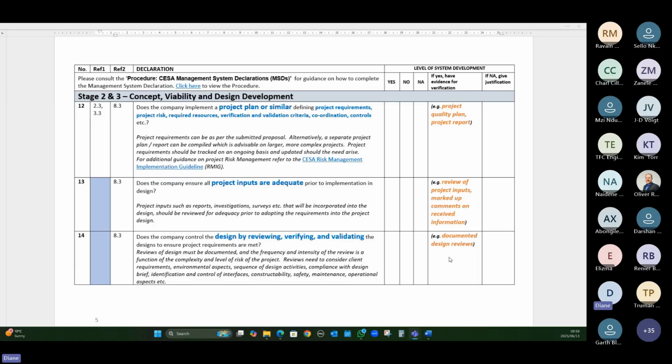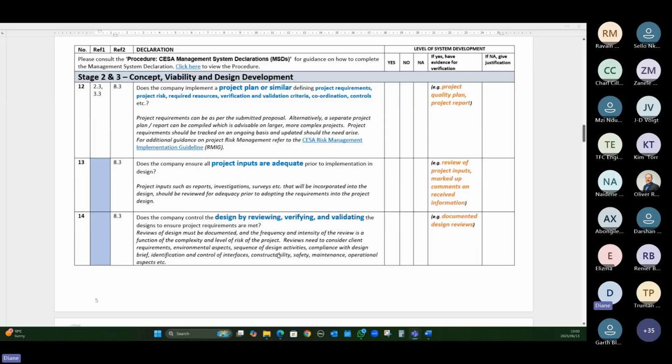If it's software that you're using, do a check with a spreadsheet, do a hand check, but just verify that whatever you get in is correct. It is in line with what you should be doing. And like I say, be creative of how you do that. It doesn't have to take a lot of time. Whatever you're doing as a check, take a photo, put PDF, put comments on, scribble on stuff, but have some sort of evidence of a review, and especially of the design, because that's where most of the origin of the PI claims can be traced back to our design function.